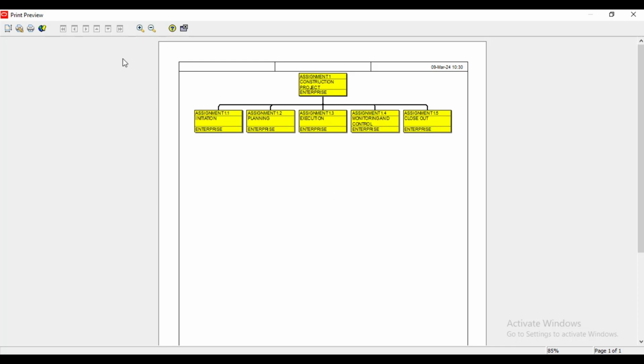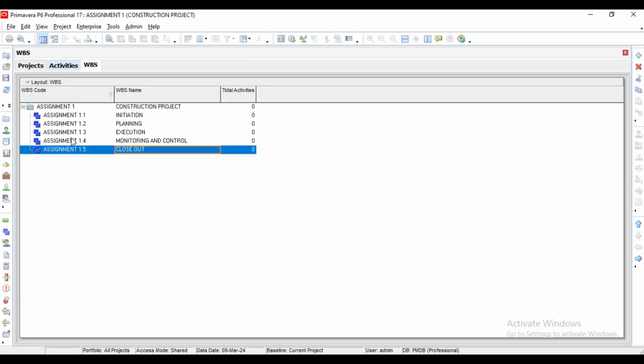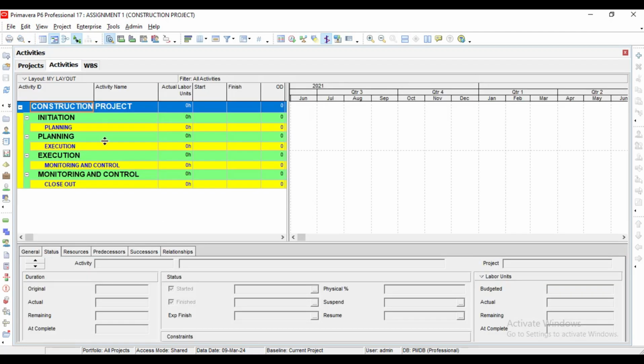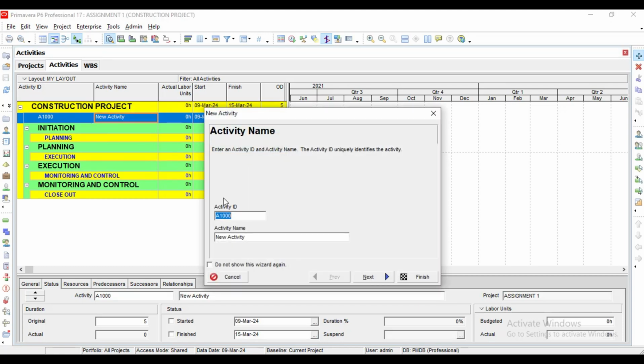So I've saved that. All right, so we go to the next thing to do, and this is where we had the activities. I close this, I come back to my table. So we go to activities. All right, so it's already giving me this. When you want to do activity, you come to the right, you can click add. It's giving me activity number one, and remember the activity nomenclature is 100, the ID rather, and the first activity is milestone, initiate project.